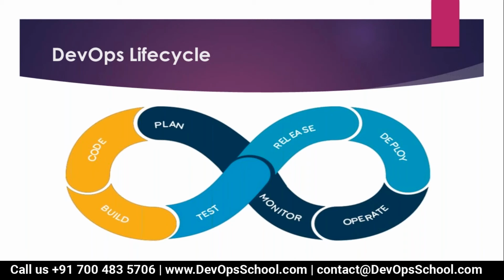Okay. Build testing, or test, is done by the testing team, correct? But releasing means releasing to the production environment, or not the production environment. It depends on the project. First, they are going to release into the UAT. After one month, they are going to put it into production. Some projects don't have a UAT environment. After test, they are going to deploy directly into production.